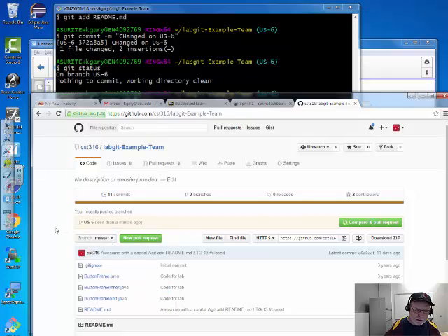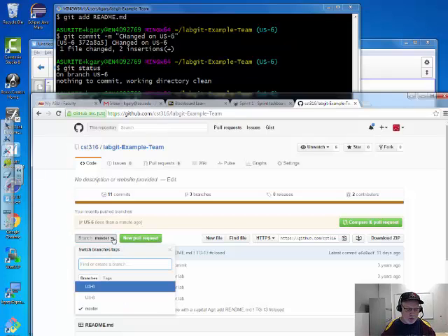So I can create the branch out on GitHub. Frankly, on your team, it's probably easier since you're already doing sprint planning. I would probably, at the conclusion of your sprint planning, when you're ready to go, have the team together go and create all the branches. Just set them up ahead of time at the start of your sprint. You've got 10 user stories, create 10 branches. You've got 2 user stories, create the branches right away.